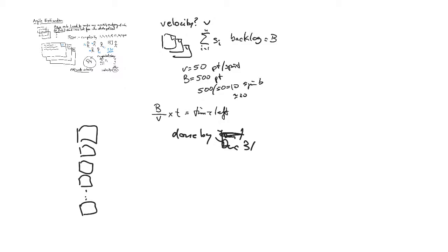So then I can say, well, if it has to be done by December 31st, and it is now, let's say April 1, so I got April, May, June, July, August, September, October, November. People are going to take off time for 4th of July, Thanksgiving, Christmas. So let's take 1 month out. So I got 7 months left. So 7 months is about 14 2-week sprints, assuming that 2 weeks is my sprint length.